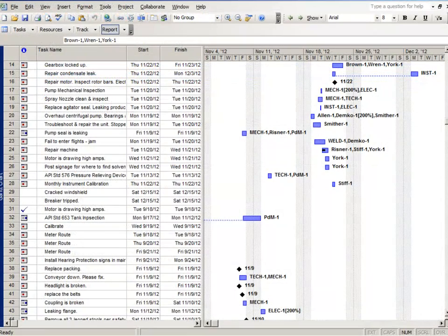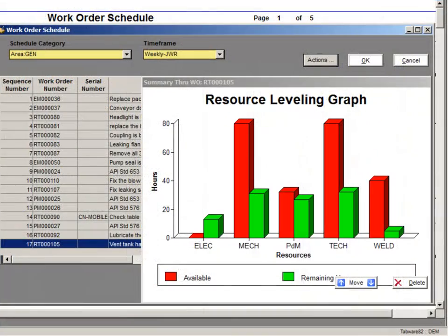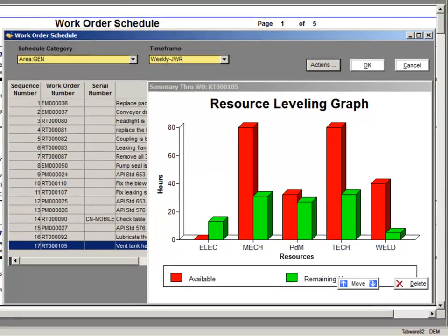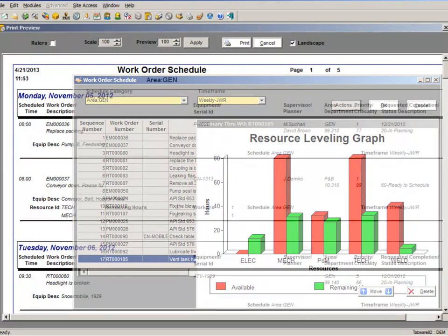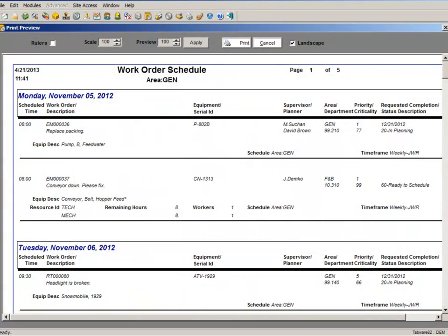Dynamic resource load leveling allows schedulers to test what-if scenarios and enables the scheduler to fully book craftsman's time to increase efficiency.